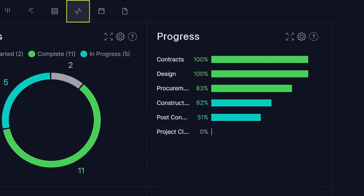The Progress panel compares planned and actual percentage completion at the task level, so you can pinpoint where any tasks are getting stuck.